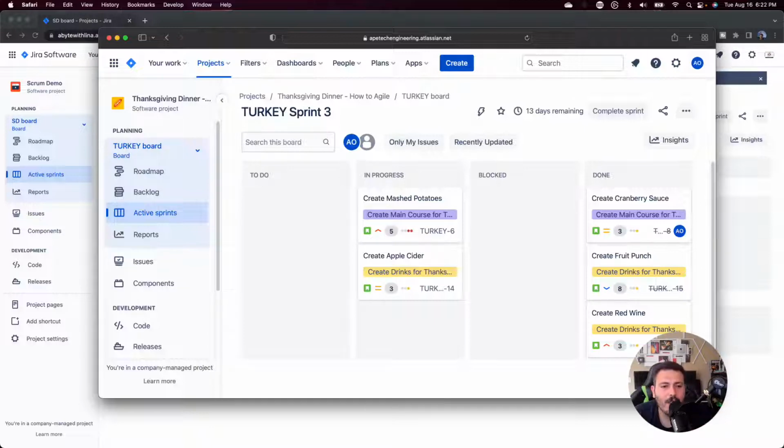And this is very, very valuable, because when you start looking at these tasks, when you look at your stories and your developers have estimated the complexity of things, and they're telling you, well, we're going to get it done within the sprint and stuff like that, every day that passes and an item doesn't get updated is a huge red flag. You want to be mindful and watching for these things, because Jira is actually going to give you a little nod here and tell you, hey, this issue has been 4 days in this column, or it's been 10 days in this column.